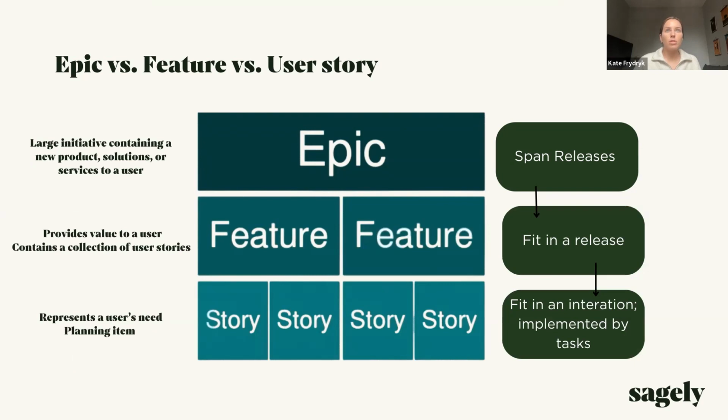It will be more so what we think the effort is. So t-shirt sizing won't talk about priority. We have a full section on this later in this discussion, but from a high level it's basically, broadly speaking, what is the level of effort to complete this body of work? And t-shirt size is typically more broad and less specific than a story point. So a story point actually gives it a value, whereas t-shirt size is like, we don't know all the details of this feature yet. We know it's going to do a couple things. And so we generally have an estimate that this will be small, medium, large, or extra large.